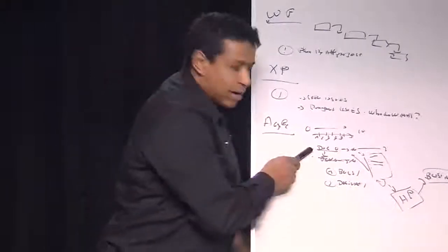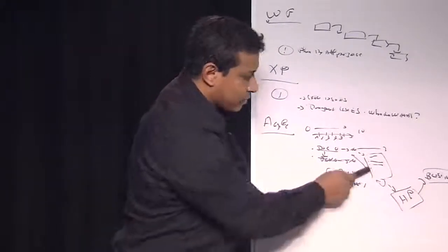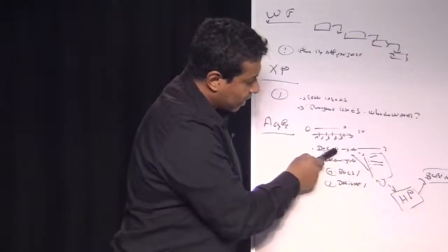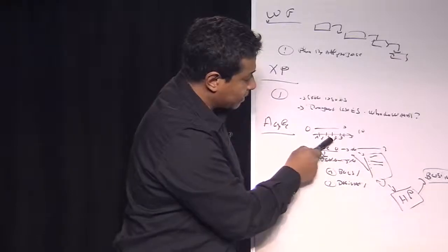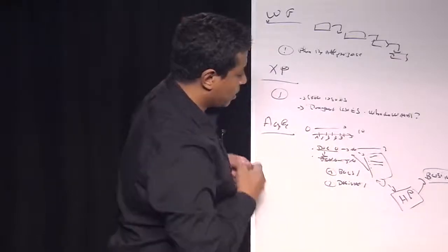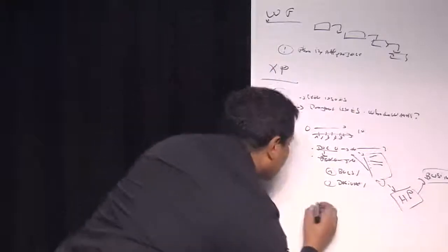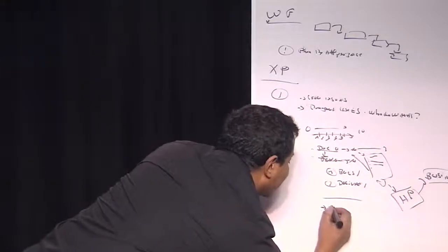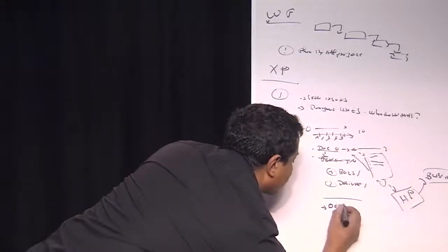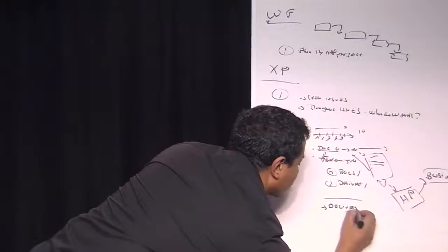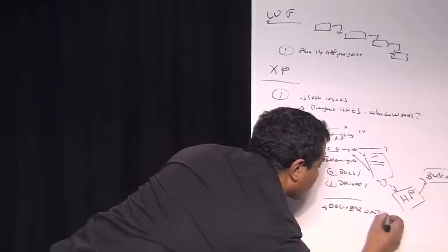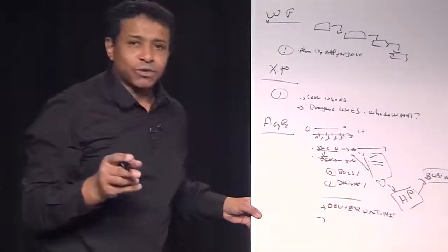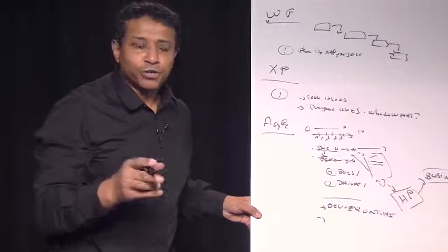So, I have a doc. I develop a small part of it, and I get back to my doc again, step by step. This ensures me of two things. I'm going to tell you the details after. That I can deliver on time, and that if I cannot deliver on time, I can know it sooner. What does it mean?